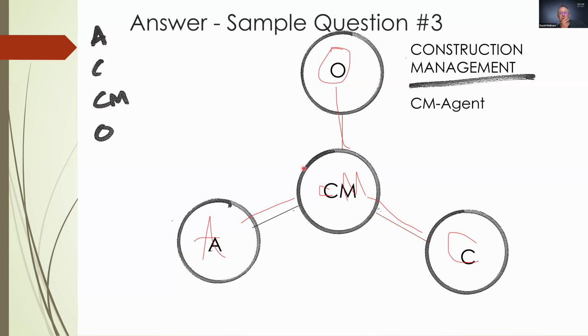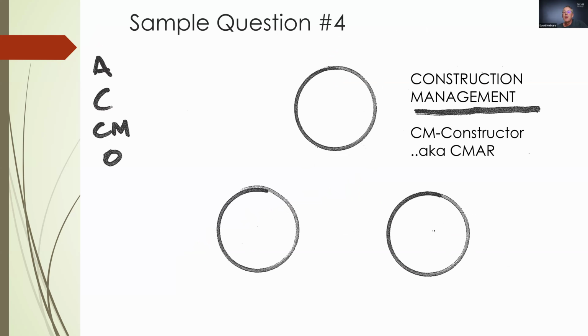So let's move on to the next one. If you can erase your marks. This is going to be construction manager at risk. The constructability and the cost advisor's role of the contractor during the project's design and transition, at some time during the predetermined time, to the more traditional, perhaps design bid build. This method frequently includes a guaranteed maximum price, which is going to be a commitment by the construction manager to hit a certain dollar figure.